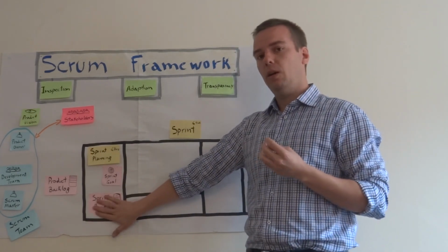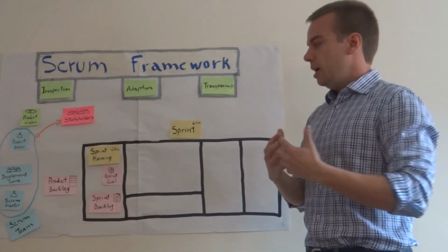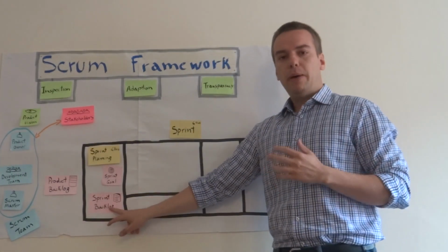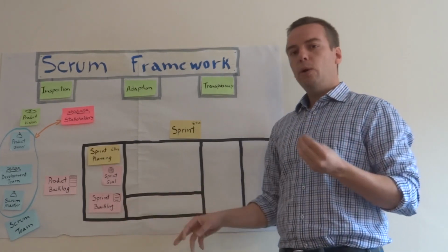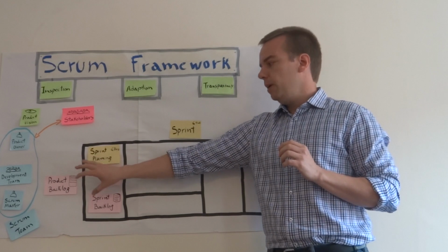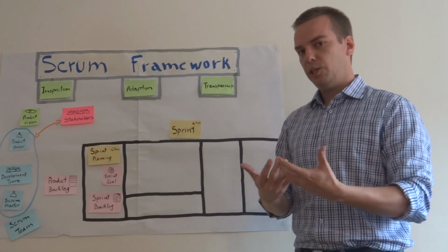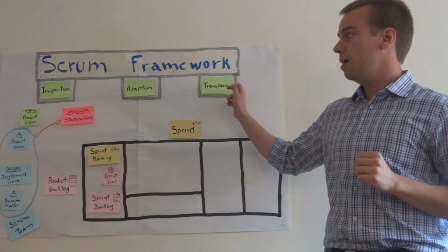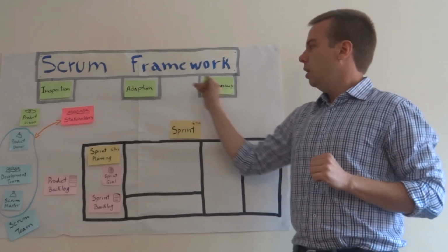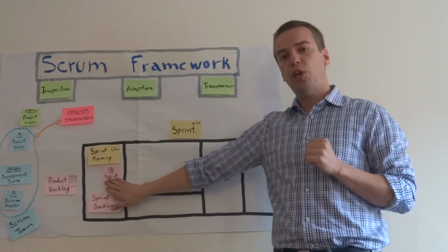The sprint backlog is owned by the dev team. They own it. And this backlog, the sprint backlog, will change or can change throughout the sprint as the team figures out and discovers more things that emerge. But we have to keep an eye on inspecting, adapting, and raising transparency of what happens here. The sprint goal shouldn't change.